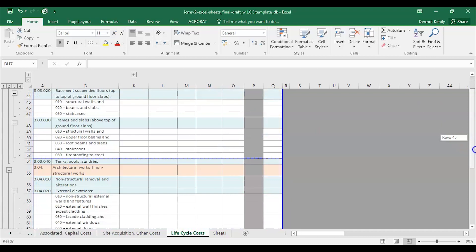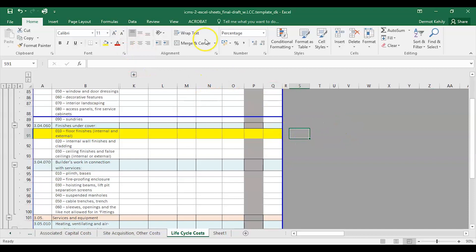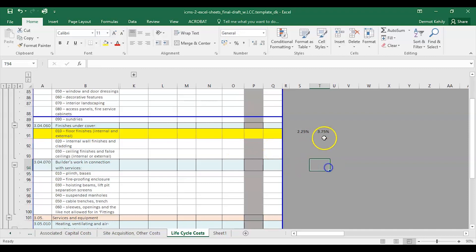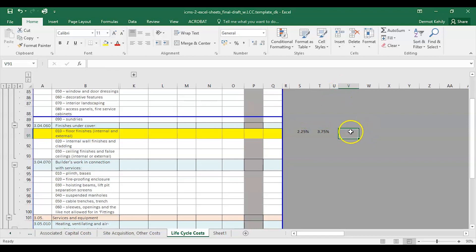Column S is my first row with escalation and discount, then my payments start after that. For my discount rate I'll use percentage format: 2.25% for escalation, and 3.75% for discount. I could link those cells to a parameter so a uniform rate populates through all different rows of life cycle costs.